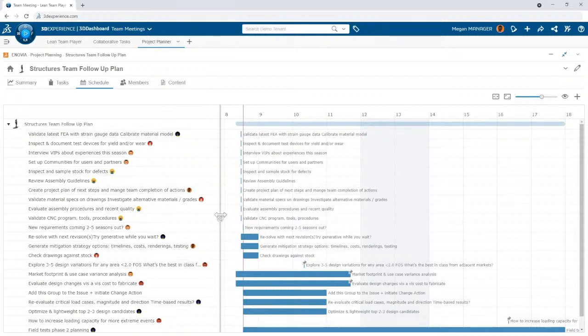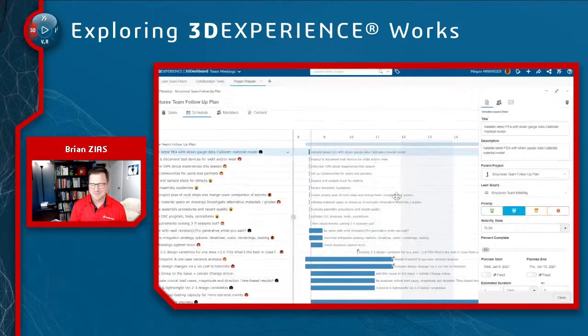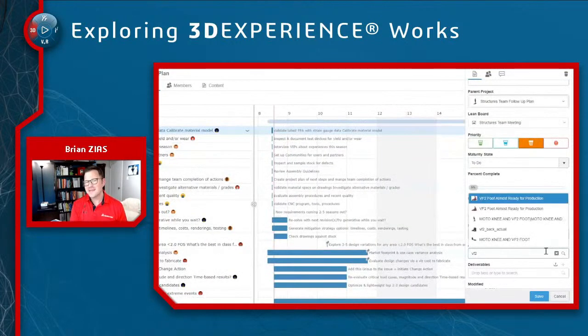So if you think about this, you guys have probably seen project plans, right? But how often are they created from the ground up versus one person, like the project manager, saying, hey, here's the chart. Everyone absorb this and go to work. What I love about this is I'm going to make a project plan. Megan's going to make the project plan. But it's all the ideas the team had. I'm just maybe organizing the ideas, helping to sequence them, put them in the right order, helping people understand the dependencies.